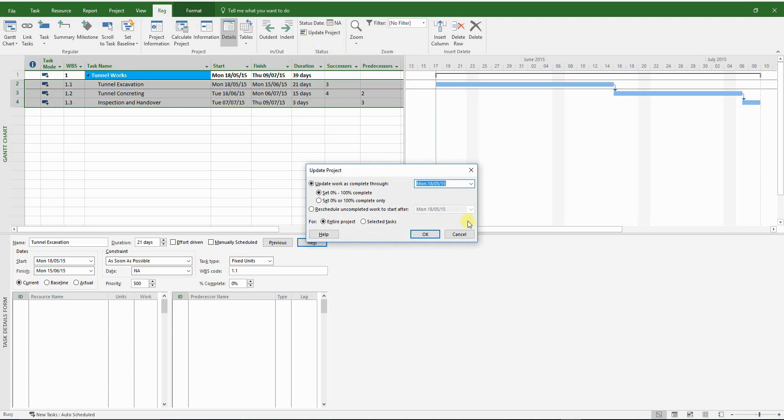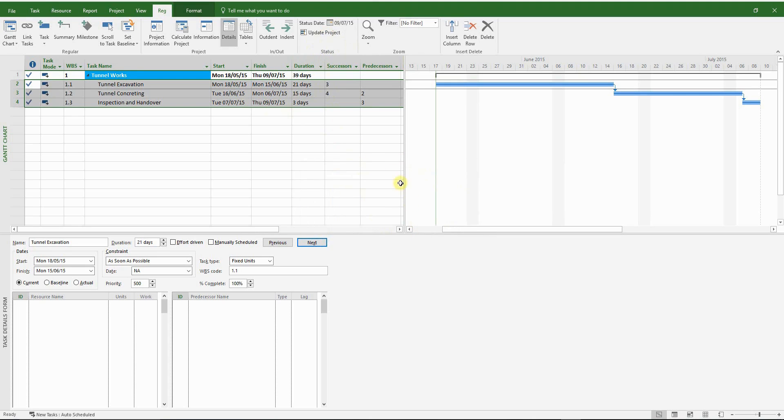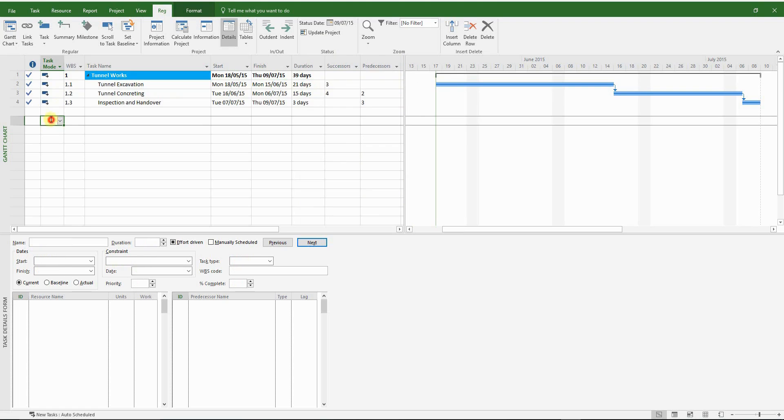So now let's update the program. And the status date should be equal to the finish date for inspection and handover. And there you have it. All activities have been updated and marked as complete.